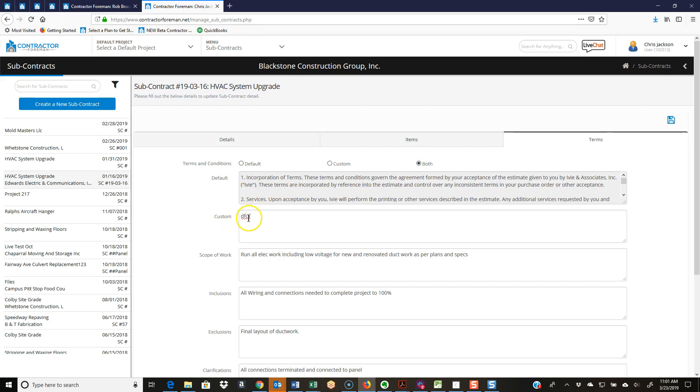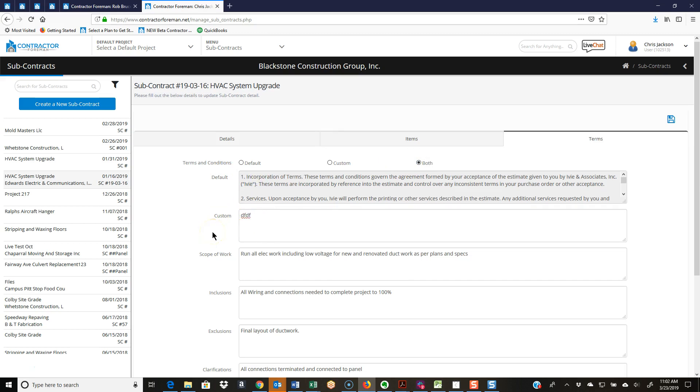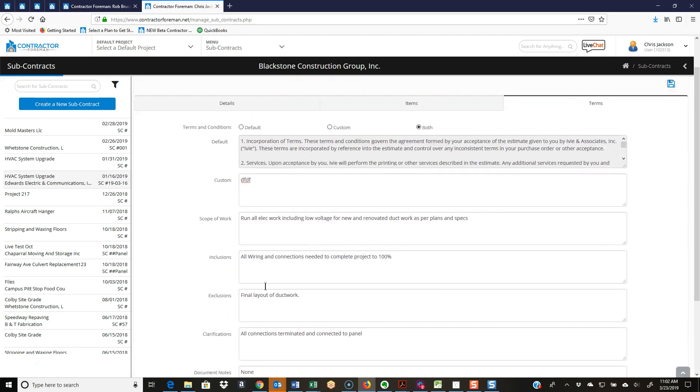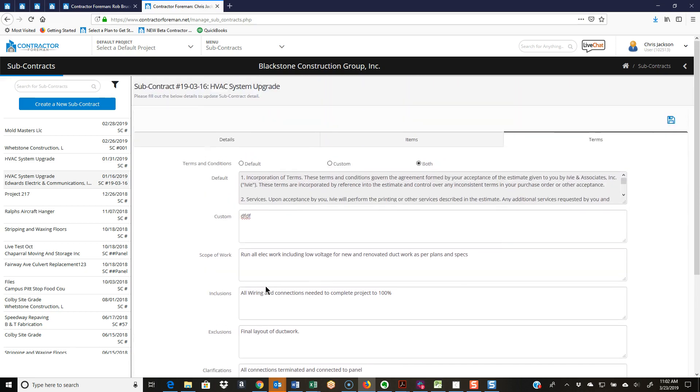On this screen we have our scope of work, inclusions, exclusions, clarifications, and document notes. Always very important to get very clear on a subcontract what the actual scope and terms of the work are. Save you a lot of headaches down the road.